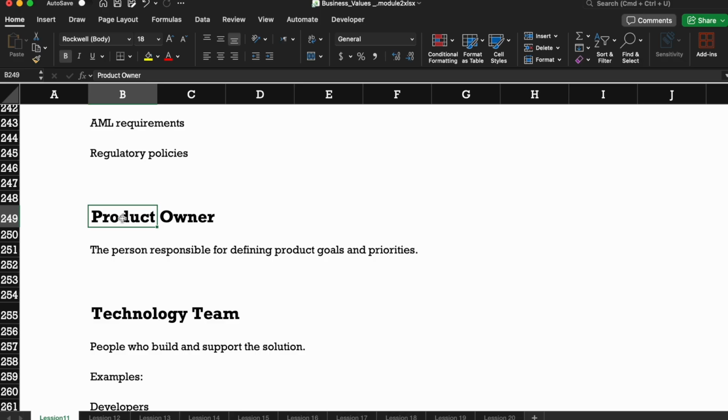So instead, can we give a drop-down menu? You send an email to the stakeholder explaining the situation: we were unable to provide a toggle button, but our recommendation is a drop-down menu instead. Will you be okay with that? You need to get a confirmation because there is a requirement change here.